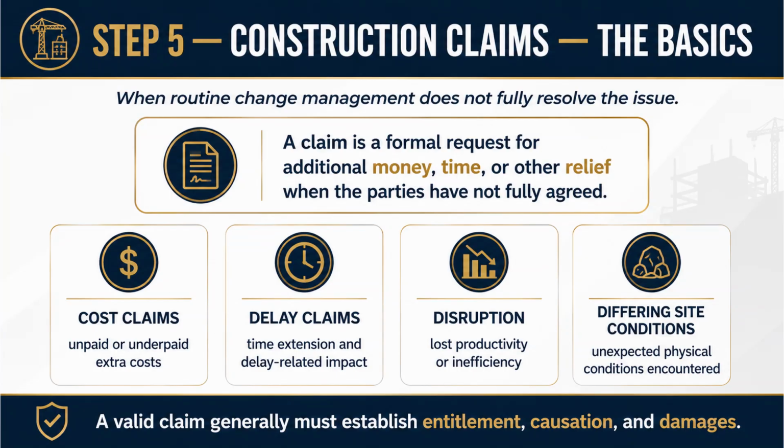And here's the principle that governs every single claim. The thing you must prove. A valid claim generally must establish entitlement, causation, and damages. 3 things. Entitlement, causation, damages. Remember those 3 words. They're on your test, and the next slide is built entirely around them.